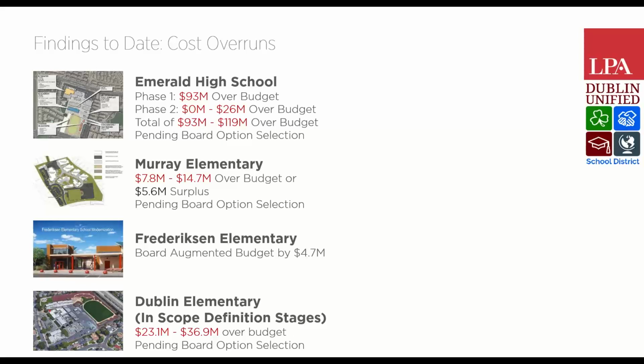In some cases, I think the entire costs of these projects were not reflected in some of the estimates. In other words, a lot of times I think people confused construction costs with project costs. A construction cost number gets floated around and that kind of becomes the number. But in reality, the projects cost anywhere from 30 to 35% more than the construction cost.